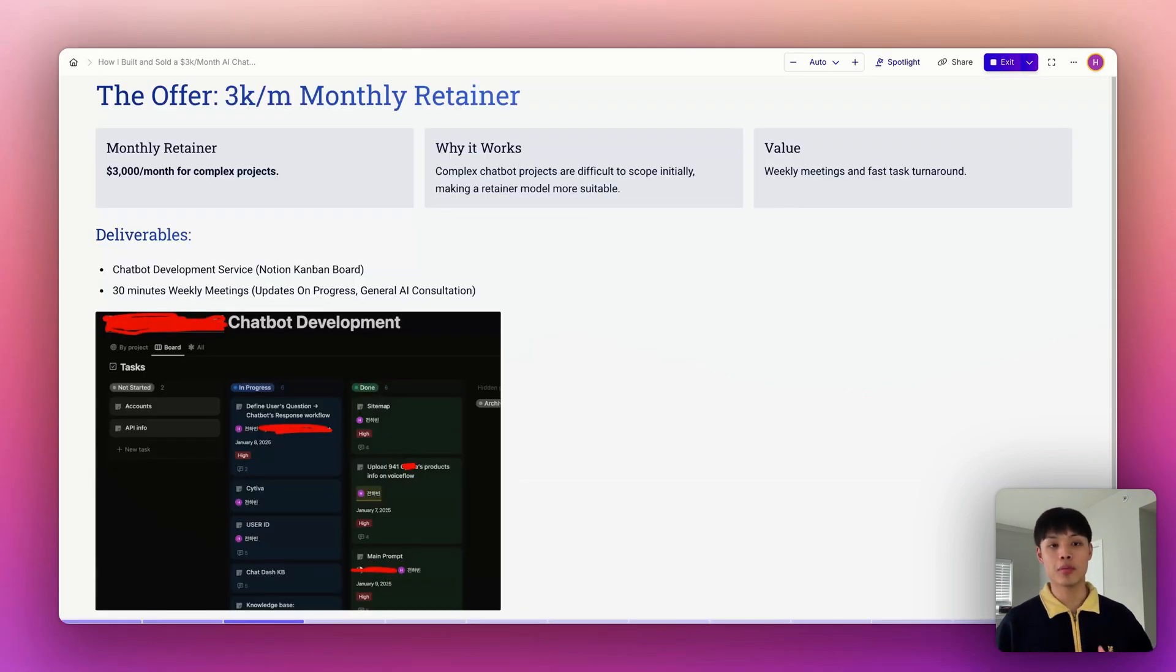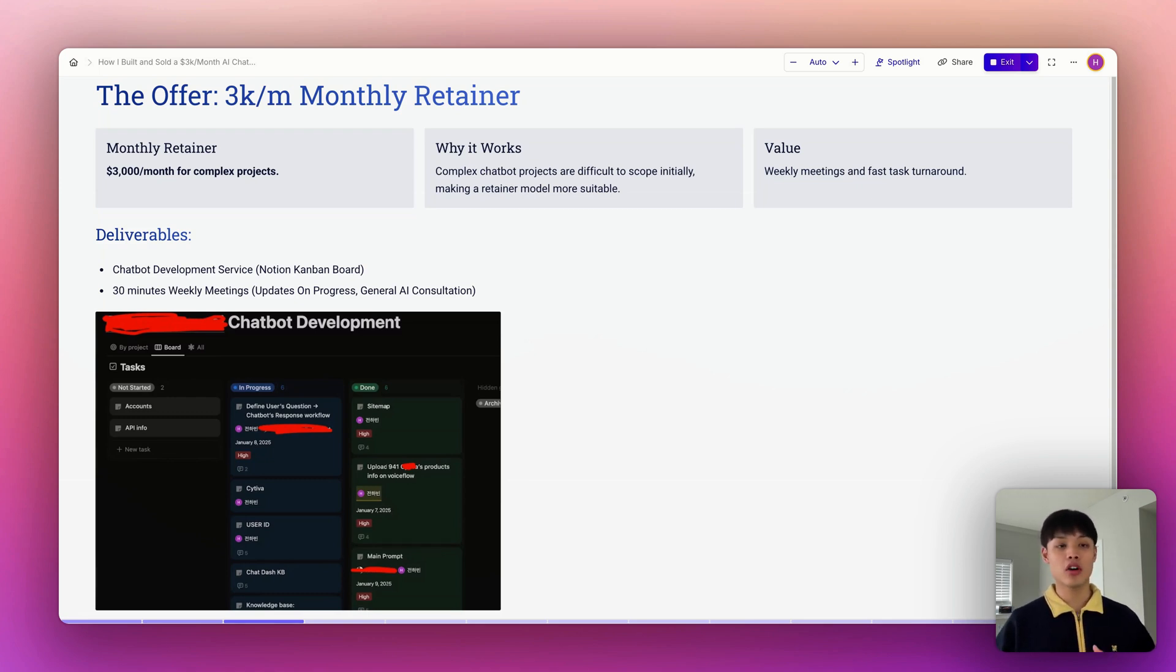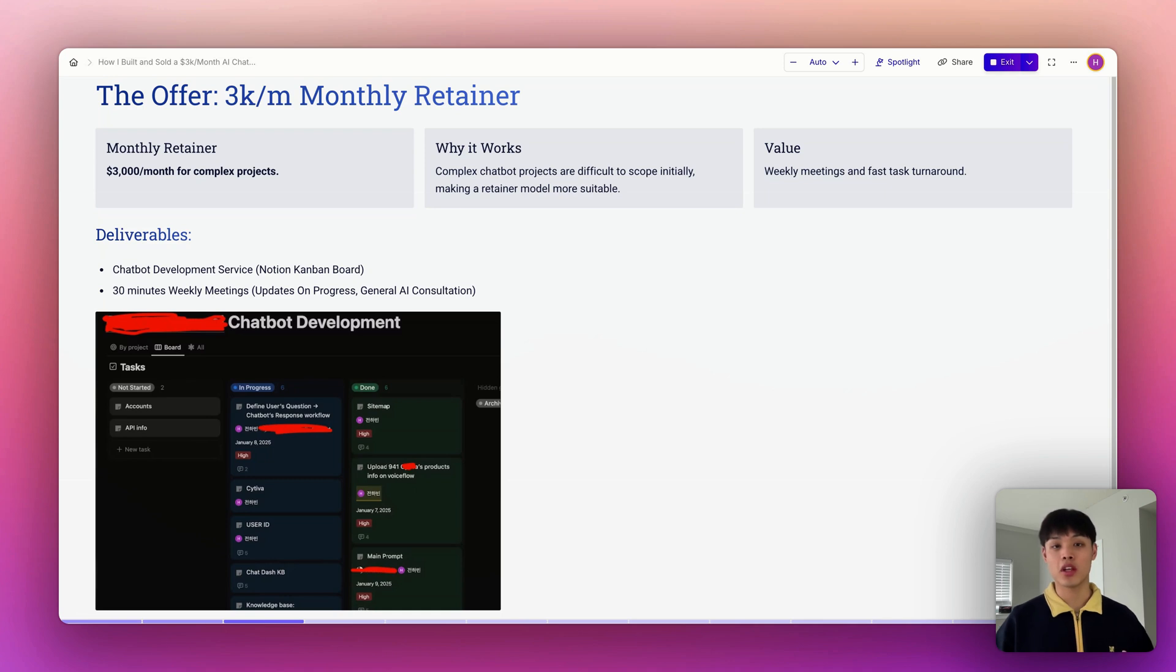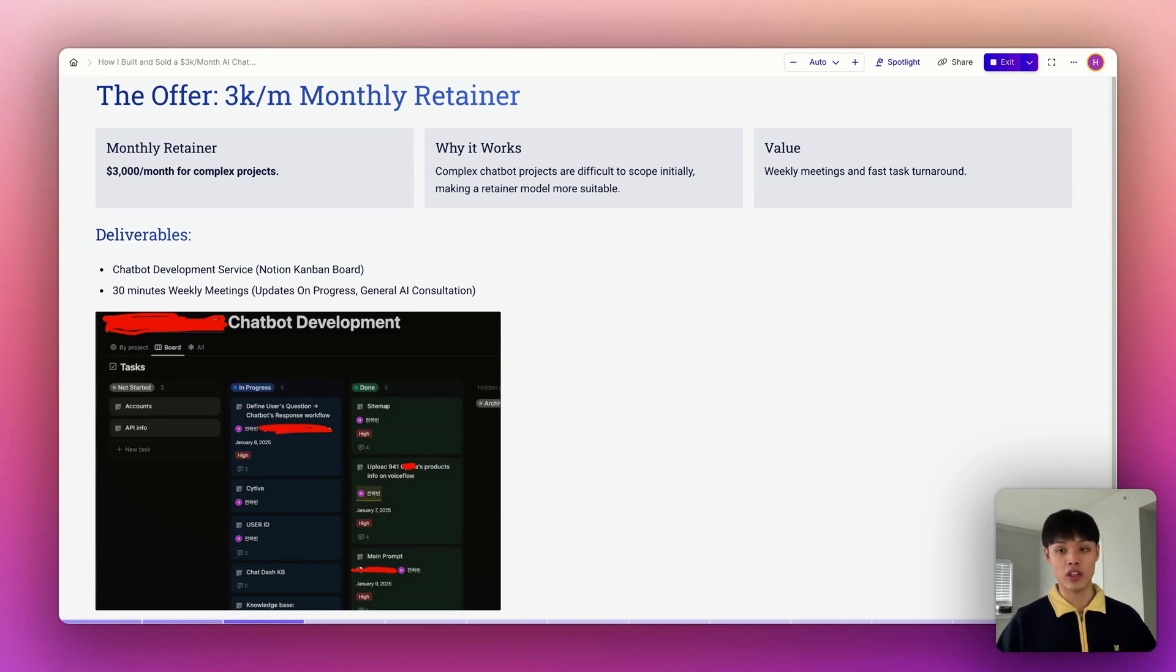Our offer is simple: $3,000 monthly retainer for complex chatbot projects. And why this model? This chatbot has a lot of moving parts and undefined scope in the beginning. So instead of trying to price every detail upfront, our retainer model allows us to stay flexible and focus on delivering results.